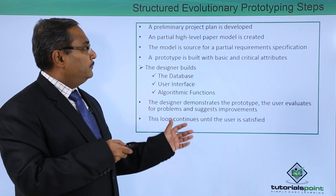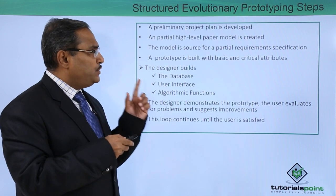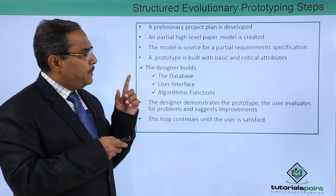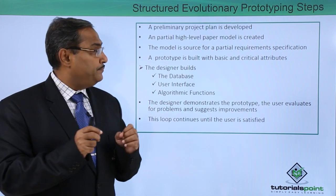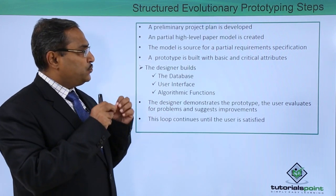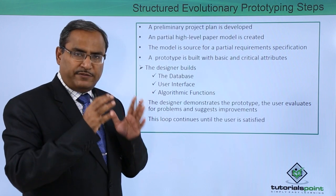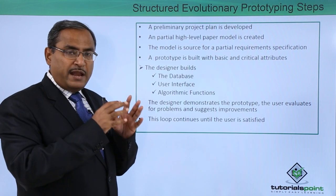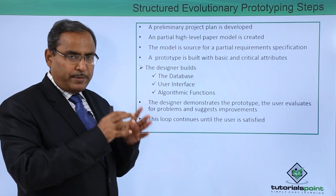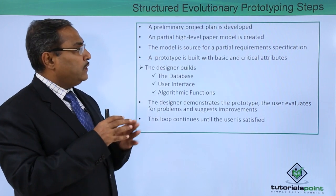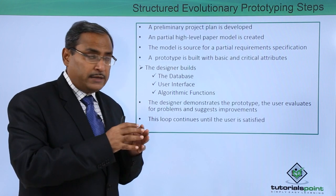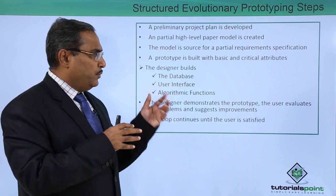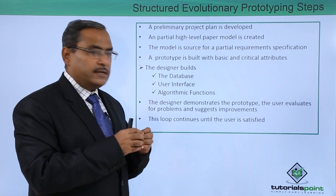The steps involved are: a preliminary project plan is developed, a partial high-level paper model is created. The model is a source for a partial requirements specification, because only the main features of the software will be implemented. A prototype is built with basic and critical attributes.